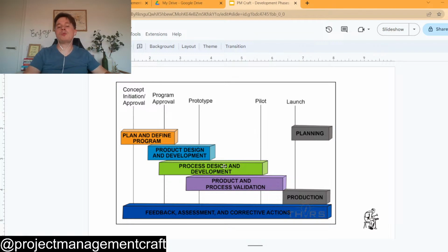But very often, what you find in those critical paths for product development is the qualification, because there are some tests that might take a couple of days, but there are also some tests that take a couple of months. I've worked on a product development project where we had a corrosion test that would take 4 months, 120 days, before we got the results. So you can imagine that was in the critical path of the project.